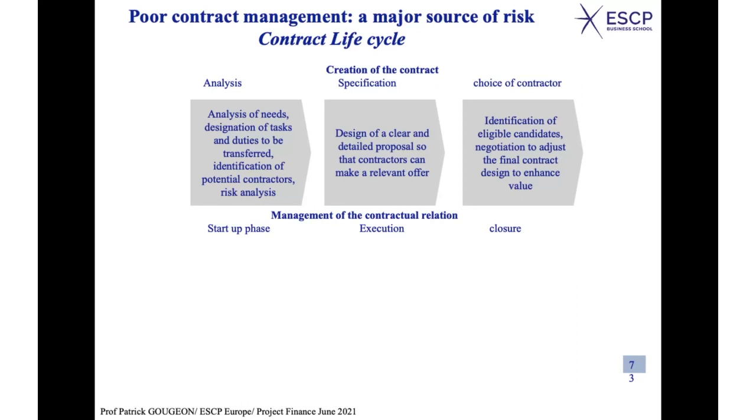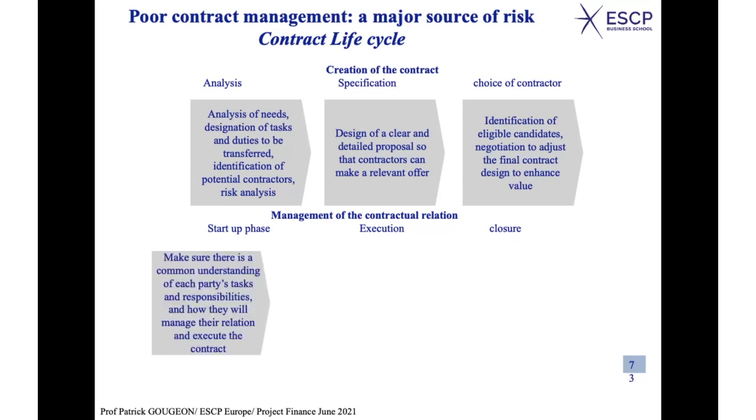What comes next? Startup phase. Why a startup phase? Because those who have made the decision, who have been involved in the creation of the contract, on both sides, on the client and the supplier side, are usually not those who are going to manage the contractual relation. On the supplier side, usually you have the commercial team.